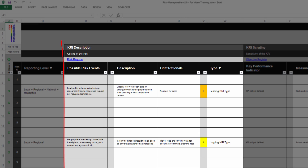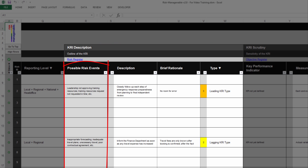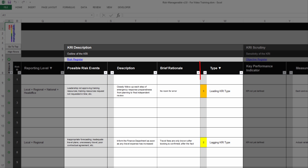The section KRI Description is where you record an outline for the KRI. The column Possible Risk Events is automatically extracted from the Risk Register tab, which is useful information for defining the KRI. The other columns are available for recording the KRI description with a brief rationale, and for selecting whether the KRI is a leading or lagging type.